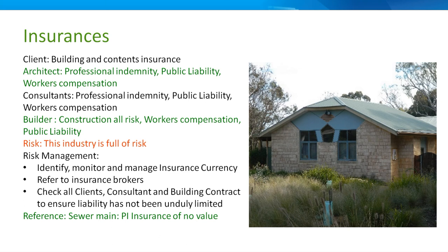Okay. So we go ahead and we document, put it out to tender, comes in, and then they go to service detect, and 5 metres down there's a 500 millimetre diameter sewer main, and that sewer main is non-gazetted, and there's no easement gazetted. It was on old ACTU blueprint records, but not on the public register. And so we call everyone in, and ACTU and the certifier who was about to get a C of O, so we're already digging footings, waiting to pour the concrete because everything's fast. We need the C of O today, the BA, the building approval today, because we're ready to pour. And so he said, I'm just having trouble, I haven't got ACTU sign off.